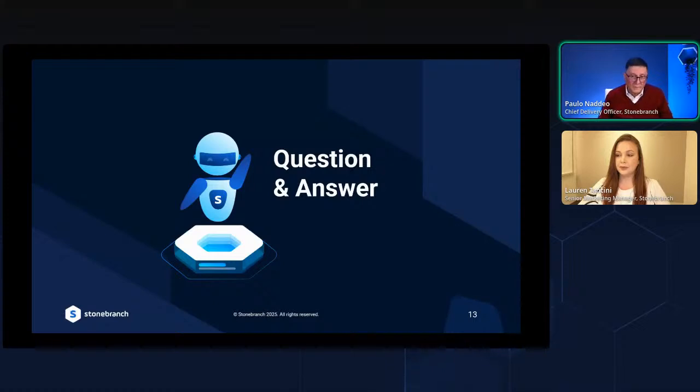One of the handouts that we are offering today explains this in detail, and there are several mechanisms you can use. If you have done a conversion before, that is a very good milestone for you to consider while estimating the new project, right? You can base your new conversion off of the previous conversion that you have done, and of course try to derive a certain number of hours or man days per job and multiply by how much the company workload has grown, right? It's not straightforward, and it requires a dedicated effort trying to analyze and understand all the impact that you are going to have. The handout is a very good way to understand that.